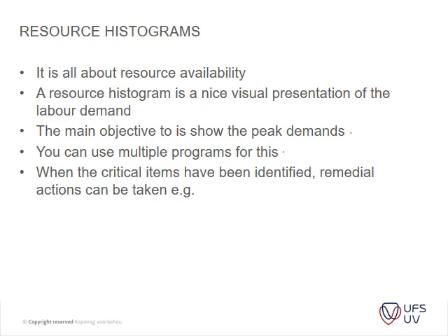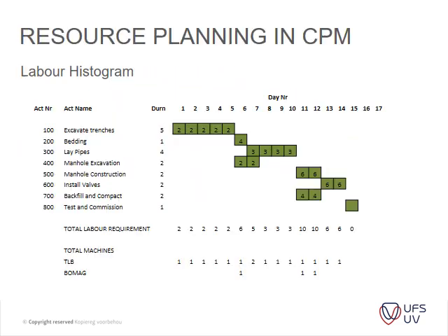When the critical items have been identified, remedial actions have to be taken, e.g. appointing more people, getting more machinery, or just letting the project run for longer. So that's the type of options that you do have.